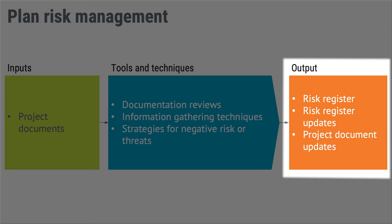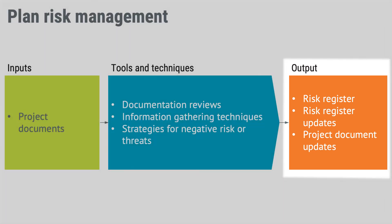Just to make it tangible: if you decide that an appropriate risk response is to source components from a second supplier, the task of sourcing those additional components would be put in your schedule as a task with someone's name on it. This is how your risk responses impact your project documents.